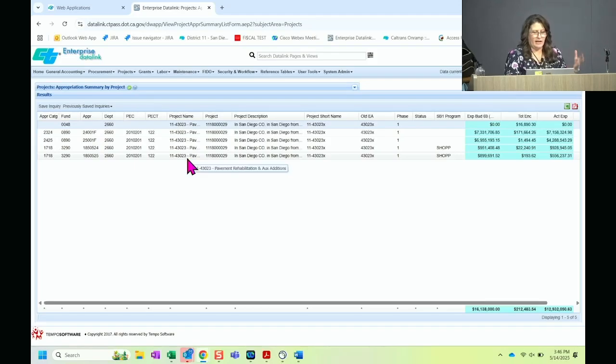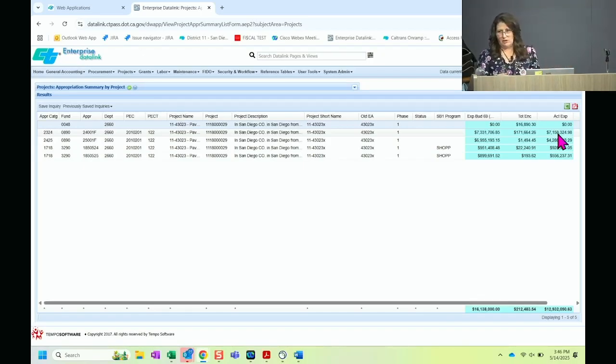So quick answers, what's going on. And of course, this one doesn't even have a budget, right? This is why it stood out. It's on its own row. It's an anomaly that we need to kind of look at. But if you look at the budget to actual, every single other budget is in check. There's no overruns on this project. I don't know what project IDs you guys are using, but right now, if you see anything in the negatives, those are the ones where you might need to make an adjustment. Maybe you've got to do a JVC, you've got to move some funds around, things like that.